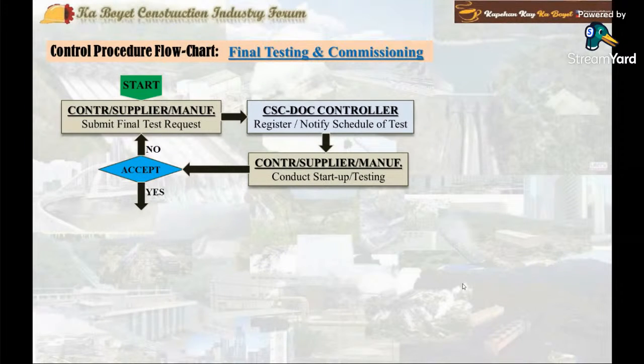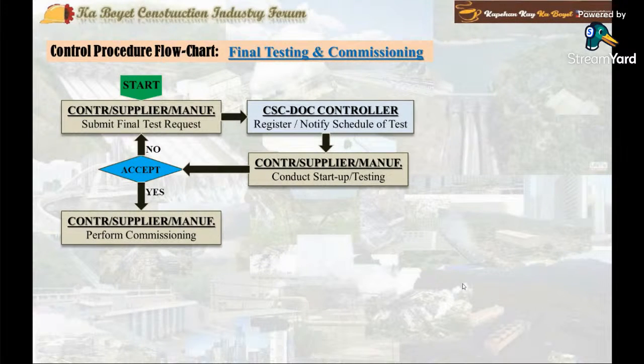The contractor performs the system equipment commissioning in the presence of the consultant. The presence of the designer is optional. Then the contractor submits a commissioning report to the project architect engineer through the consultant, copy furnishing the designer and the QS consultant. The output document of this process is a commissioning report.